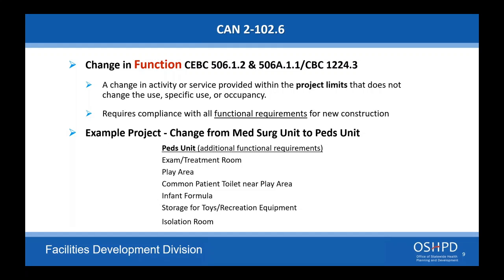I'm going from memory here. We have a Google training or expedited, and you'll see a list. We currently have 4 expedited building permit processes, and they can all be done online now. Most of them, actually all of them, have to do with skilled nursing facilities: water heater, handrail. What's the latest one? HVAC replacement. So those are your expedited building permits. There's one more. Oh, TV mount. We are working on some more for re-roof for a skilled nursing facility, as well as generator replacements.